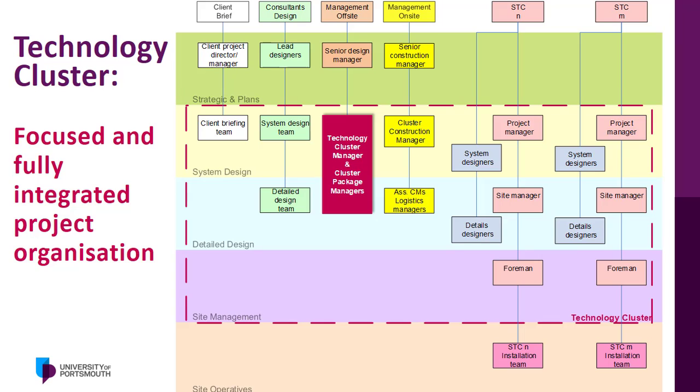Technology cluster approach brings the design management and the construction management one level down to become part of the cluster, filling this management gap. By breaking the project organization around a set of interface technologies, i.e. clusters, the management effort will be focused on the issues related to the cluster. The cluster manager, who has the management skills and the particular technological knowledge of the relevant cluster, is in a way a project manager of a sub-project, i.e. the cluster. He or she is supported by package managers who are responsible for each STC package in the cluster.